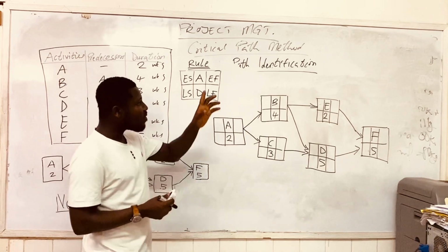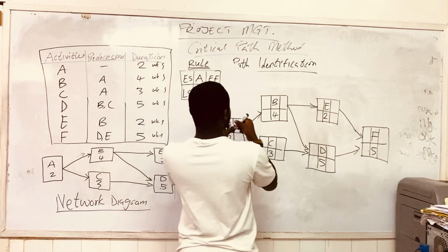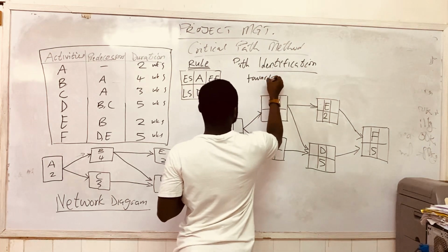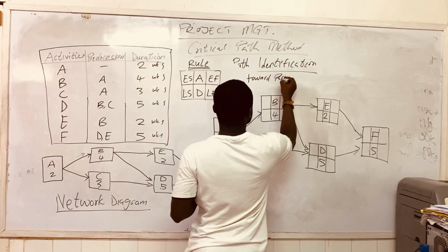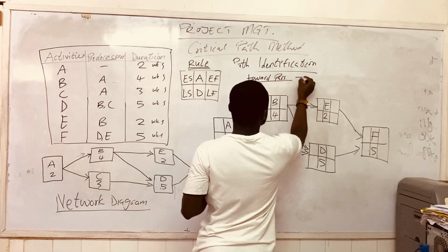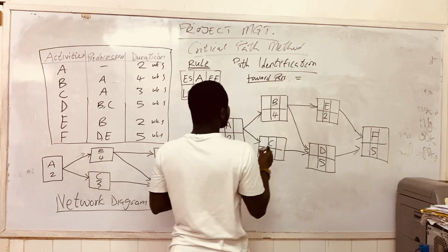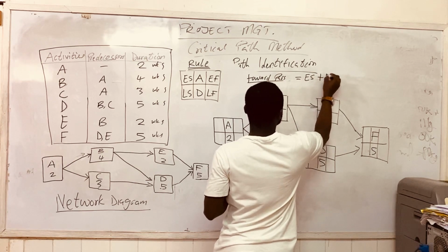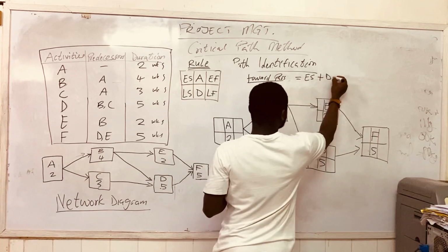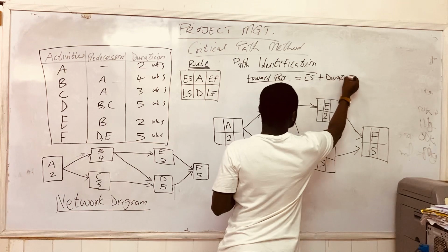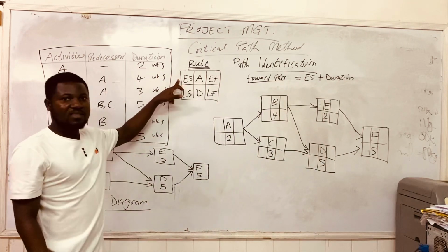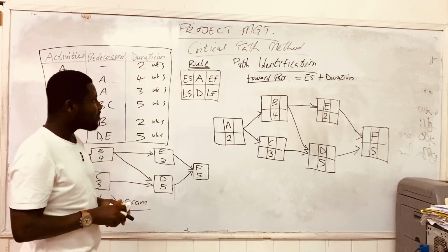And we say our forward pass is equal to ES plus duration. And we say our ES is the earliest start time.